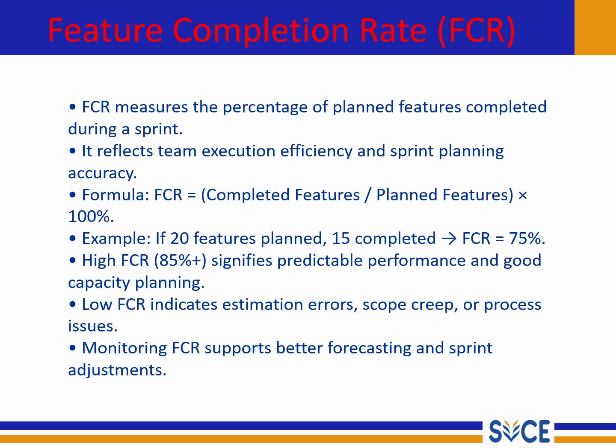In the next slide we will see the feature completion rate, that is FCR. Feature completion rate measures the percentage of the planned features completed during the sprint. It reflects the team's execution efficiency and sprint planning accuracy. Here the formula for the feature completion rate is the completed features divided by the planned features, times 100%.